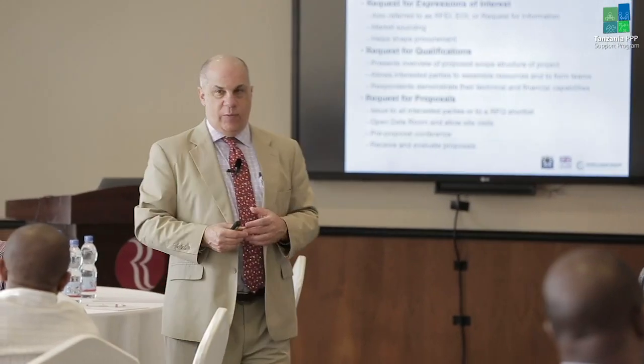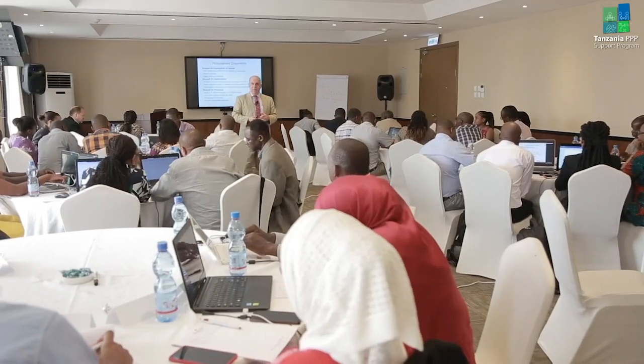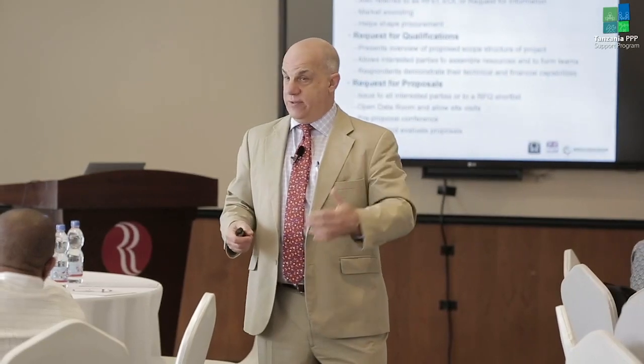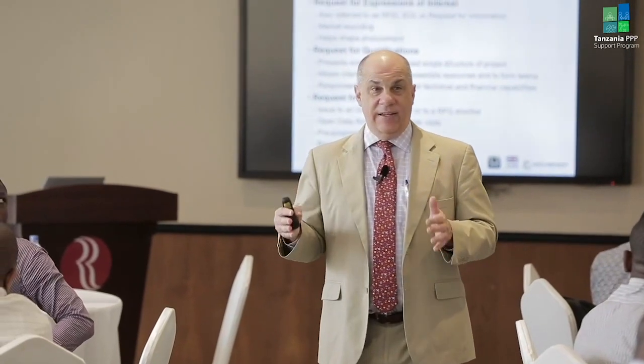Finally, we have a request for proposals. Now, this one can be quite expensive. I was recently involved with a public-private partnership. I was on the private side, where we made a proposal to actually design, build, finance, operate, and maintain a courthouse through a public-private partnership. To put that proposal together cost about $2 million US. And there was no guarantee that we were going to win that project. So this one takes a lot of time and effort.